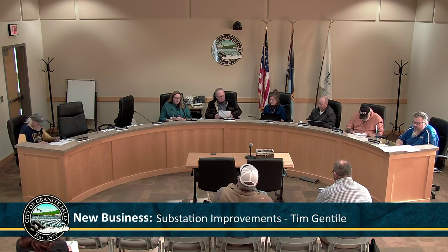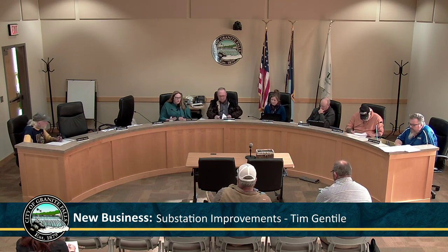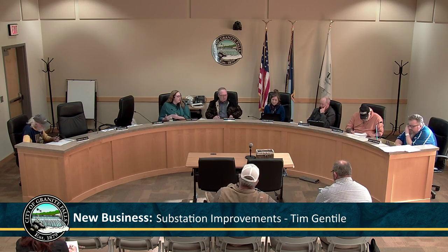So, I'm gonna back up and start a little bit of a recap here. As part of this project, we've replaced 2 transformers, one at each substation, and 1 switchgear at the Bush Park substation. We have the additional improvements, and there is a list enclosed with Tim's memo. And then we have the installation cost. Now, the installation cost is, at this time, still an estimate, but we are somewhat confident in that estimate because it was acquired via contacting a contractor for an installation cost. So we're comfortable with that cost to move forward financially.